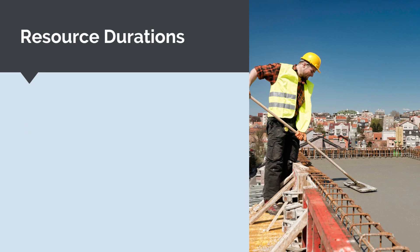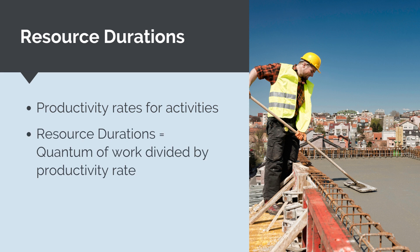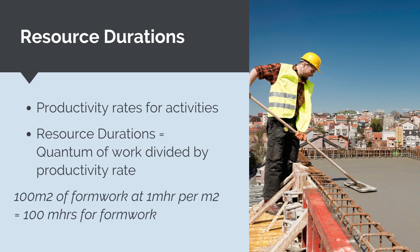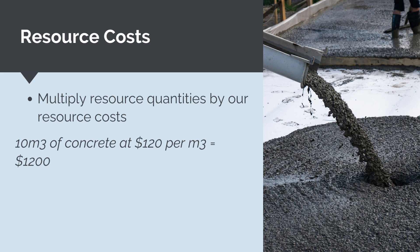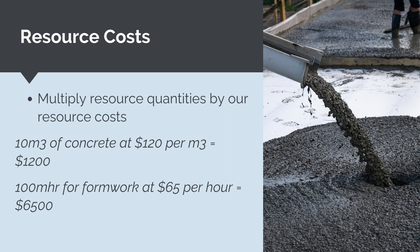Now we know what activities we need to complete and what resources are required, we need to estimate the duration we need those resources based on productivity rates. Our resource duration equals the quantum of work from our bill of quantities divided by our productivity rate. For example, if we need to complete 100 meters squared of formwork at a productivity rate of 1 man-hour per meter squared, then we need 100 man-hours for formwork. We then multiply resource quantities by our resource rates — for instance, 10 meters cubed of concrete at $120 per meter cubed gives $1,200, and 100 man-hours for formwork at $65 per man-hour gives $6,500.